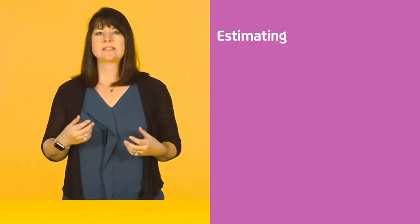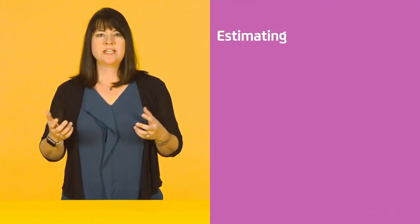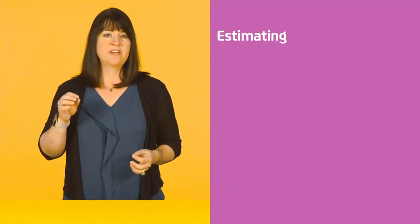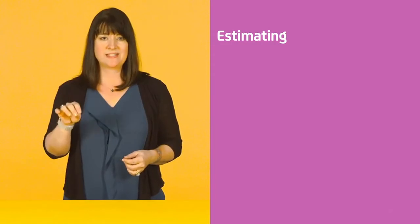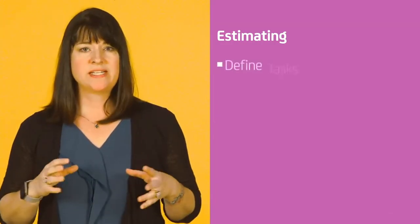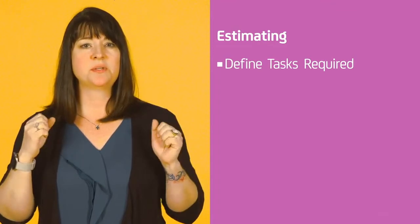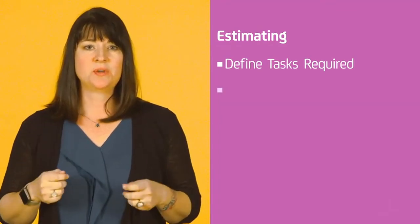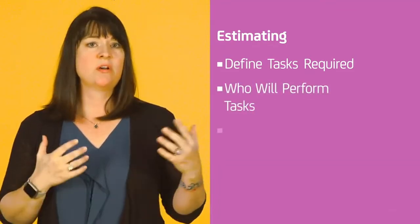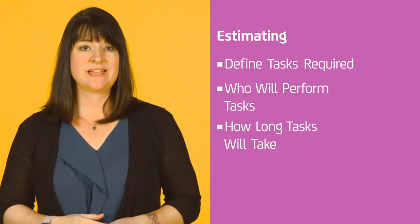Estimating brings us to the next level of granularity, so the team can determine exactly which work will fit into the next iteration. To estimate a story is to understand exactly what tasks are required to complete it, who will perform those tasks, and how long those people think those tasks will take.